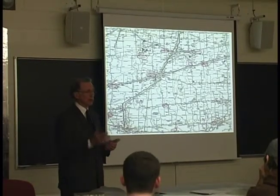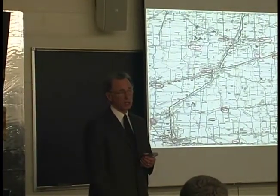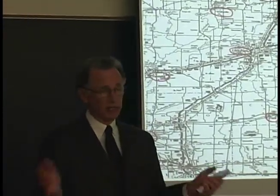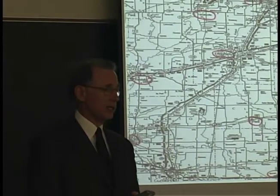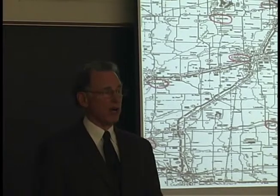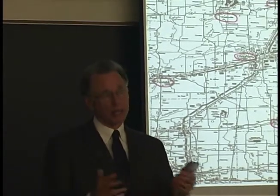And if you don't have that basic gut feeling about what that price ought to be, then you can really make some serious mistakes. As an example, everything we do is hard dollar, and once we submit that bid and once we sign the contract, then we're obligated to build it for that price. As I indicated, it's not a negotiated thing in public works construction. You might be able to go to a private owner, if you're doing a driveway or building a house, and say, hey, I misfigured the form lumber, or I misfigured the roofing material. The owner might have some leeway.